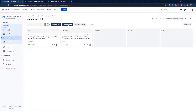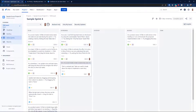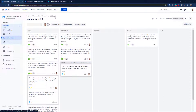What's really cool is you can mix quick filters together — enable two, three, or even five at once. The operator between them is AND, so both conditions must be met. Quick filters are global to the project and associated board, meaning everyone with board access sees the same filters — there's no way to make a private quick filter.